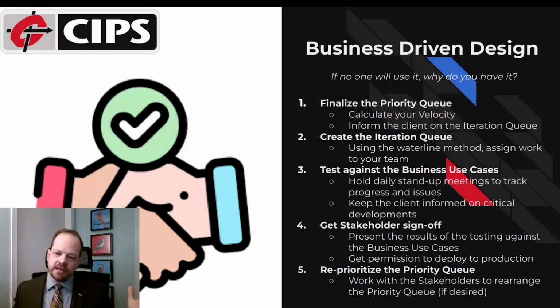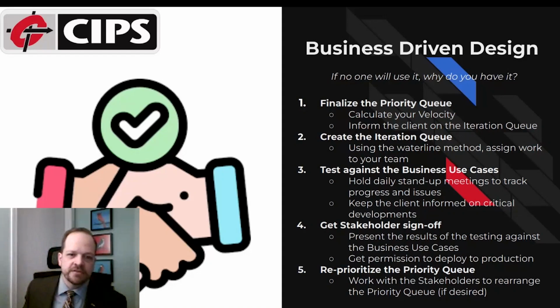By using a Fibonacci sequence, you get past the fact that the human mental model works logarithmically. You're counteracting that logarithmic scale that the human mind has, and it means that your estimates, especially by the time you get through a couple of iterations, will become extremely accurate. After 5 years on the one major project I worked with, we were off by about 3 story points for every 150-ish story points per iteration. So it was very accurate.